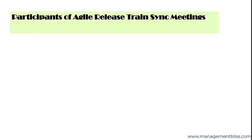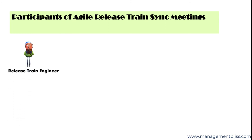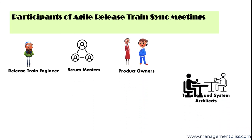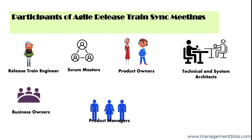Who are the participants of ART Sync meetings? Release Train Sync meetings involve many teams, starting from 5 to 12. Therefore, these meetings involve a good amount of people, particularly the Release Train Engineer, Scrum Masters, Product Owners, Technical and System Architects, Business Owners, and Product Managers.